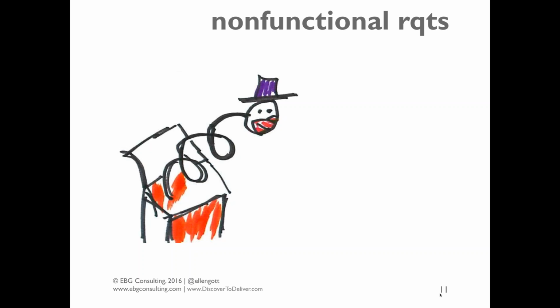And this causes a lot of chaos in teams. One of the effects that I see on some teams, they reserve a sprint or an iteration called a hardening iteration. That also could be called the hair on fire iteration, where a lot of those non-functional requirements are addressed at the very end. So teams aren't conversing about that, and that causes a lot of chaos.